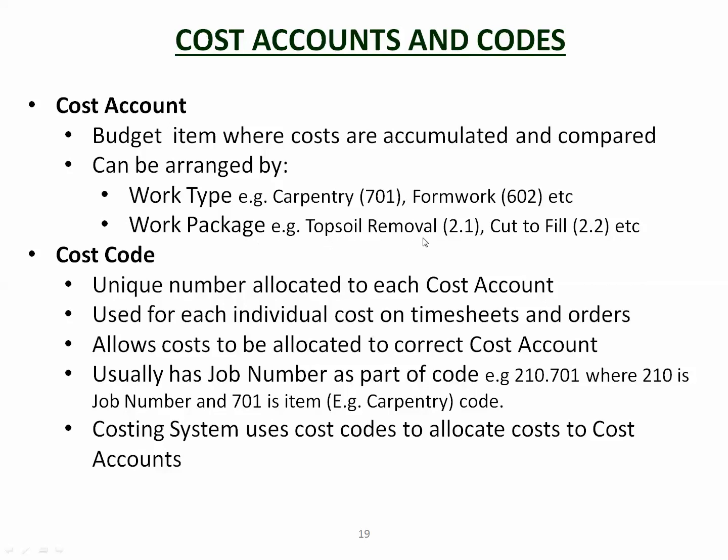So topsoil removal, for example, would include a whole lot of work types. It would include stuff like excavator operation, topsoiling, and that sort of stuff. Another work package might be concreting, which would include carpentry and formwork and concreting all in one work package.